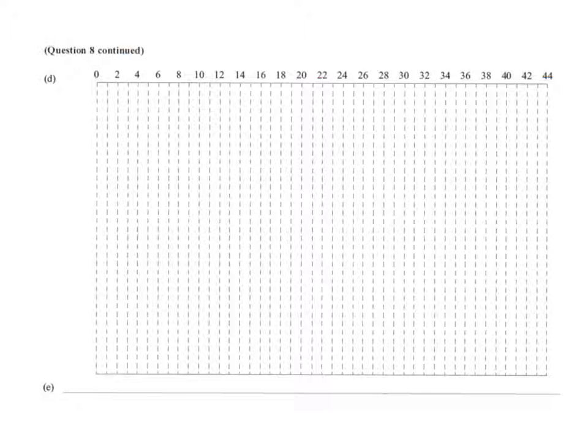Now we're going to draw a Gantt chart, which is like a project management chart, to show how the project can take place. Now, it's not possible for me to draw these with a ruler, but you really must draw these with a ruler and as accurately as possible. The first thing is to draw the critical path.